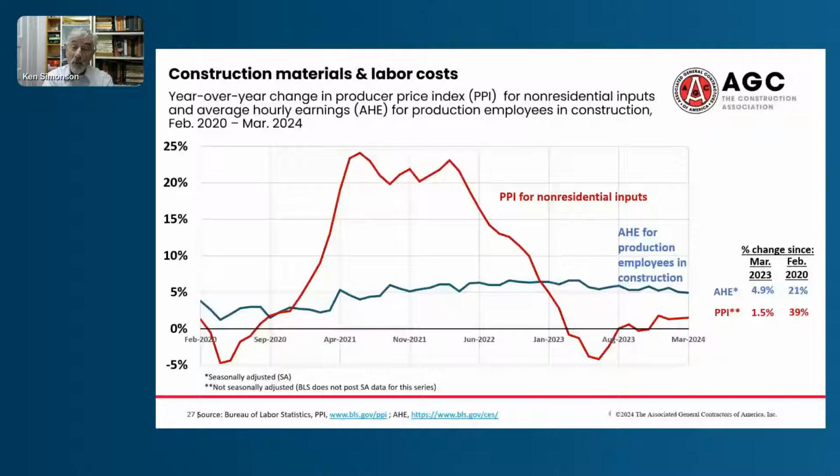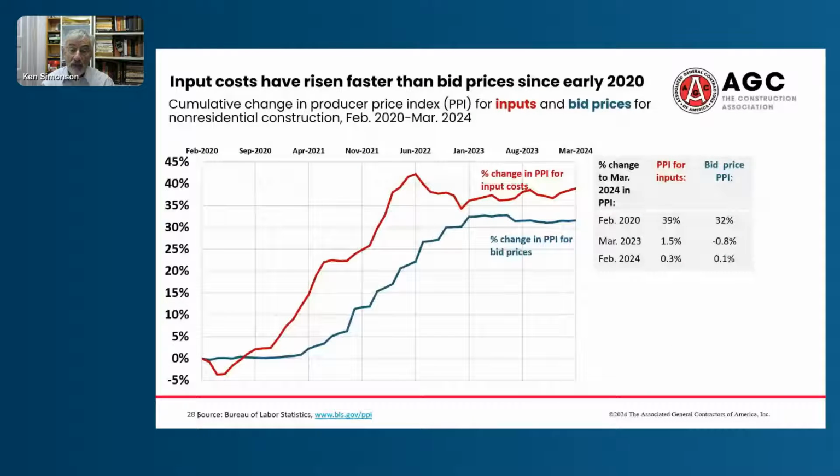The biggest problem with the supply chain has been with electrical equipment, specifically switchgear and transformers, and in some cases, the electronics for elevators or HVAC or security systems. And these problems look like they're also going to continue through this year. Well, let me move on to a comparison of the prices that contractors are facing versus what they've charged.